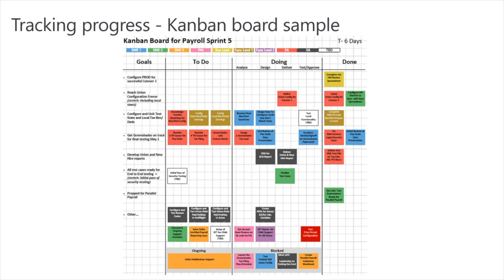You're not trying to do this at that level. You're trying to say, at the level of a sub-process, what is it I've got to deliver? You've got a to-do list, you've got things that you're actually doing, and then you've got the done list. If you're using a visual element like this during your triage, it's very easy to see where people are stuck. At a business process level, it's easy to pull in the right help. You're not getting dragged down into the lowest level of detail, where the team leads and the individuals are more than capable of dealing with that.